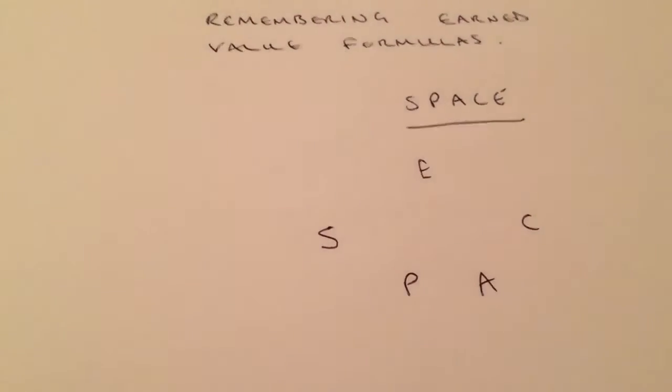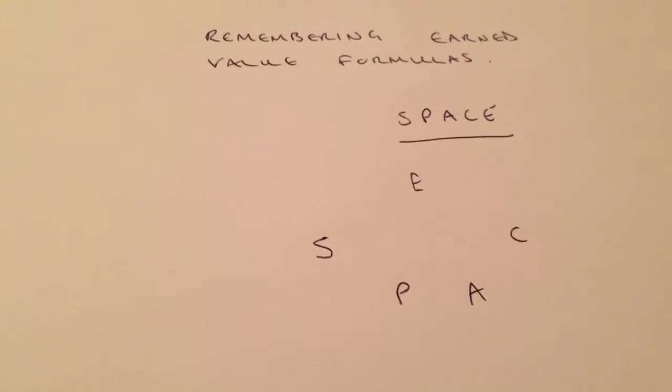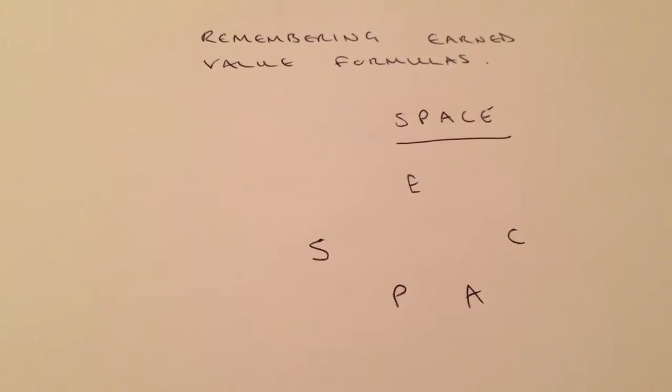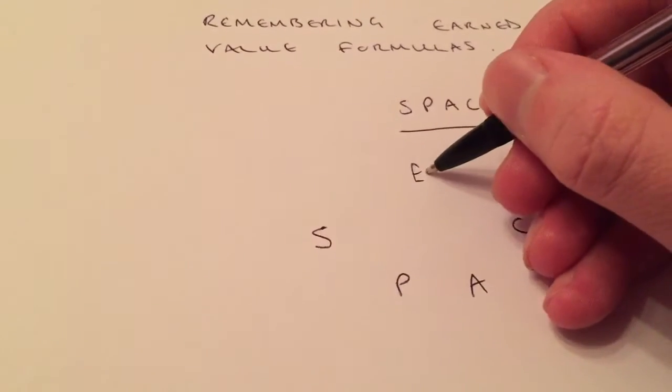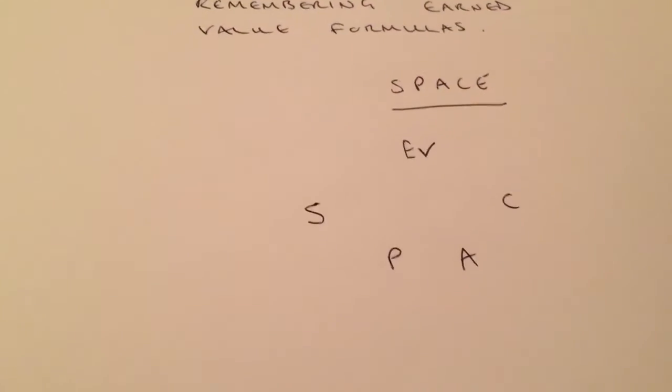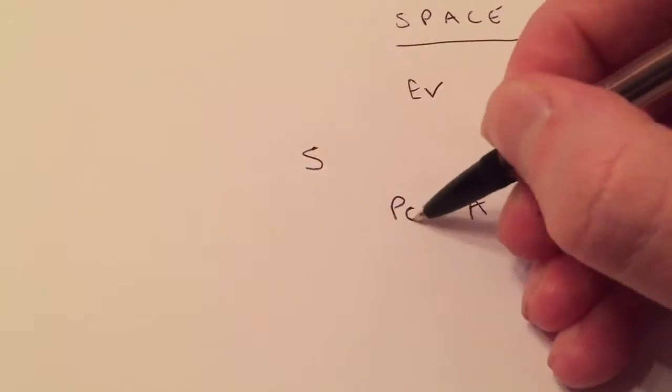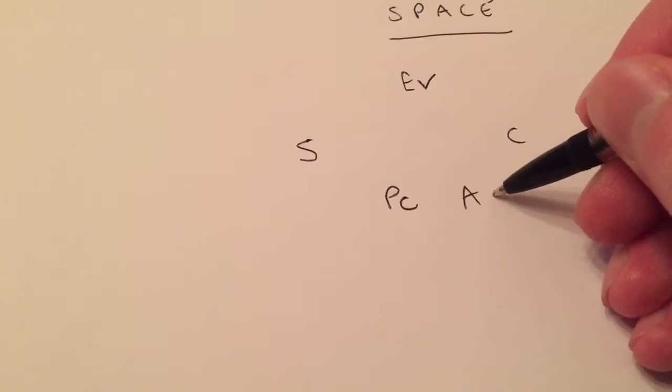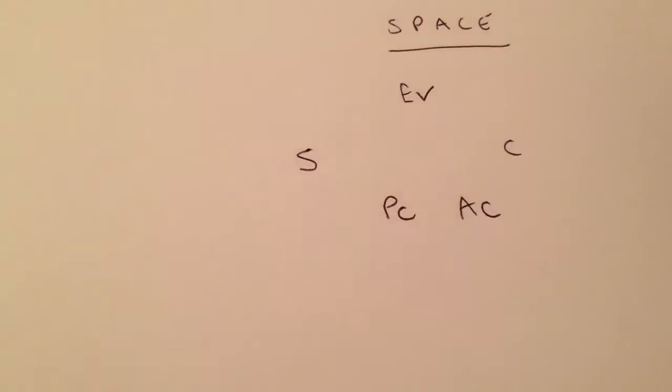Now from SPACE you can work out all of the formulas fairly easily. So E is earn value, P is planned cost, A is actual cost. So then it's quite obvious that S is schedule and C is cost.